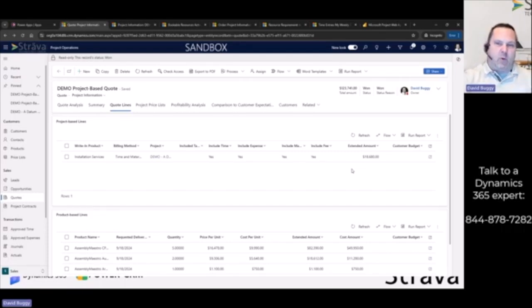But it might not require this rigorous kind of process where you go through an actual project record and have somebody build out the work breakdown structure. There's a very simple path to that that's called the top-down method, right? Where you just have a quote. If it gets won, that's when you create the project itself. Okay, so you really don't go away from quote.